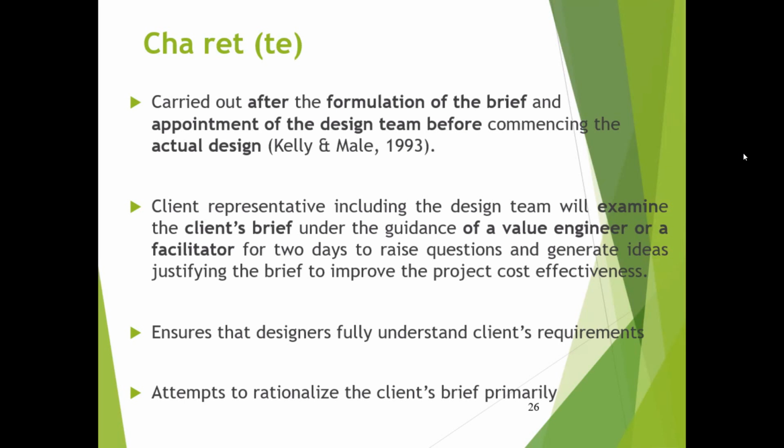Why? As we have gone partway through the design. So therefore, the earlier the better, because it gives higher potential for value enhancement, increased potential compared to incorporating partway through the design.